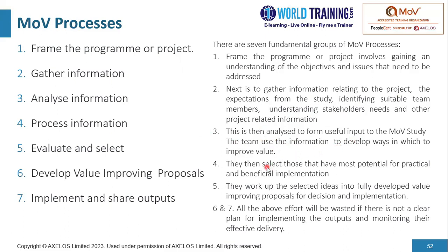And then number 4, we process information. They then select those that have the most potential for practical and beneficial implementation. Number 5, evaluate and select. They work up the selected ideas into fully developed value improvement proposals for decision and implementation.